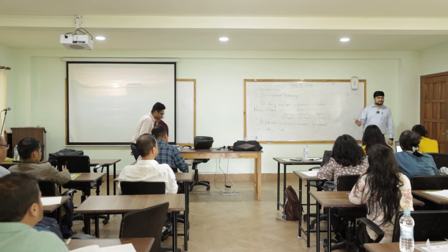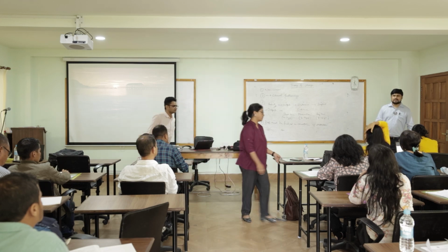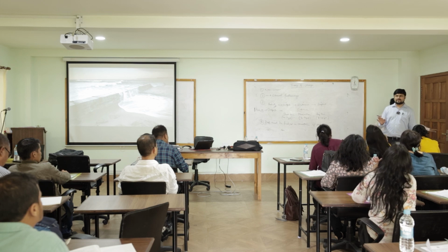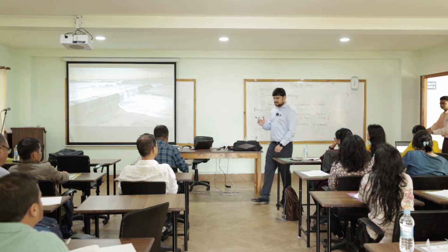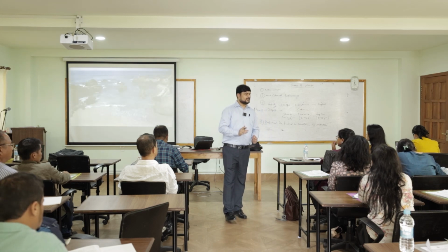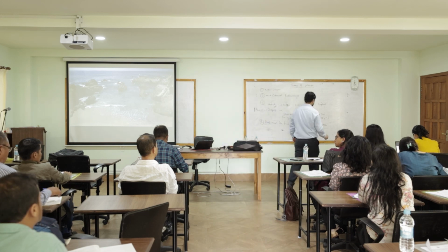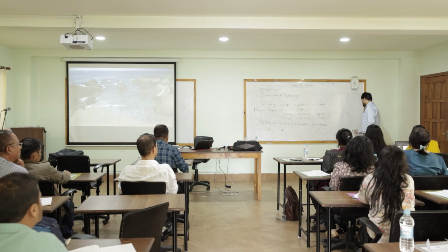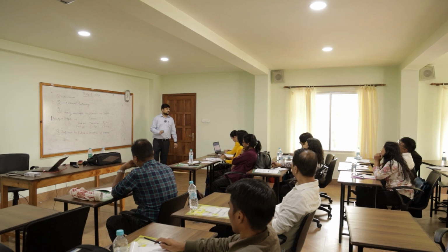Okay, so these were some of the points that I just wanted to point out about the theory of change. We also need to come up with a risk and assumption every time we are preparing a theory of change. So theory of change is basically a diagrammatic representation in separate boxes. It follows a bottom-up approach. By bottom-up, I mean you have to start by thinking about the activities, outputs, outcomes, and impact level indicators. Okay?